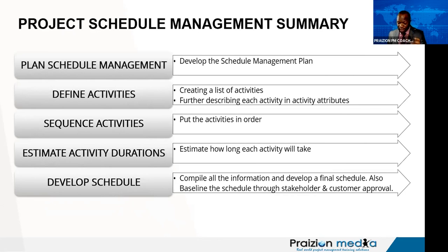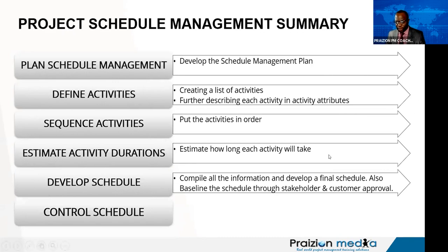They're trying to tell you that you may end up having to modify scope if when everything comes together in the schedule, you realize, oh, let's cut this off. This is going to take us out too far. For whatever reason, you might decide to add or reduce scope based on what you're scheduling. You see, all of the knowledge areas are interconnected, and working on one area could unravel stuff that needs to be corrected in other areas. That's the summary of it all. So develop schedule is a very important process. This is where it all comes together, and this is where you need to look out for possible changes as well as those 4 unique things: schedule baseline, project schedule, project calendars, and schedule data.